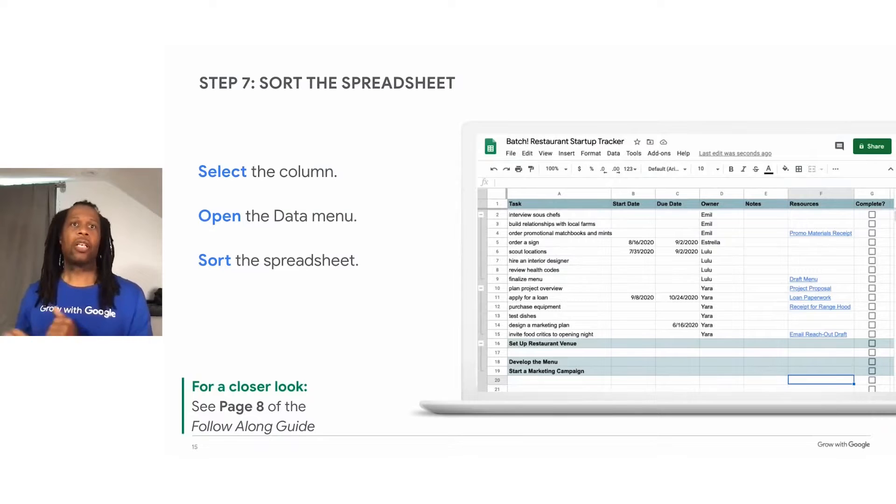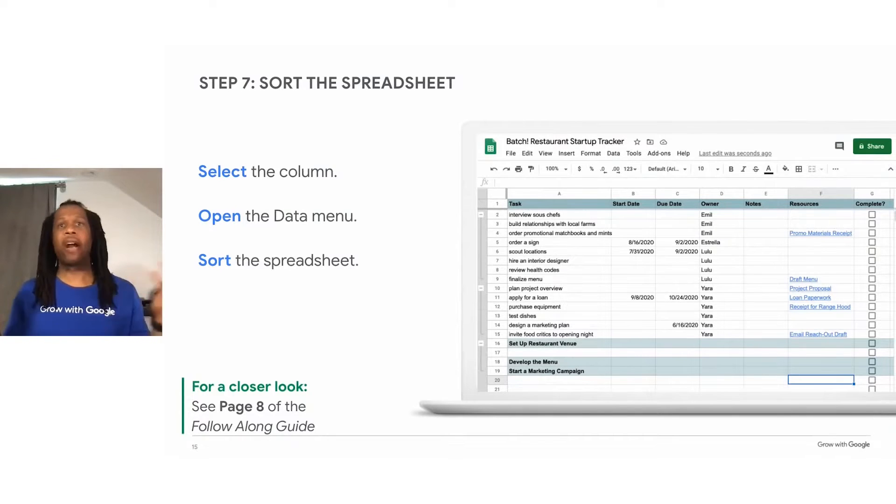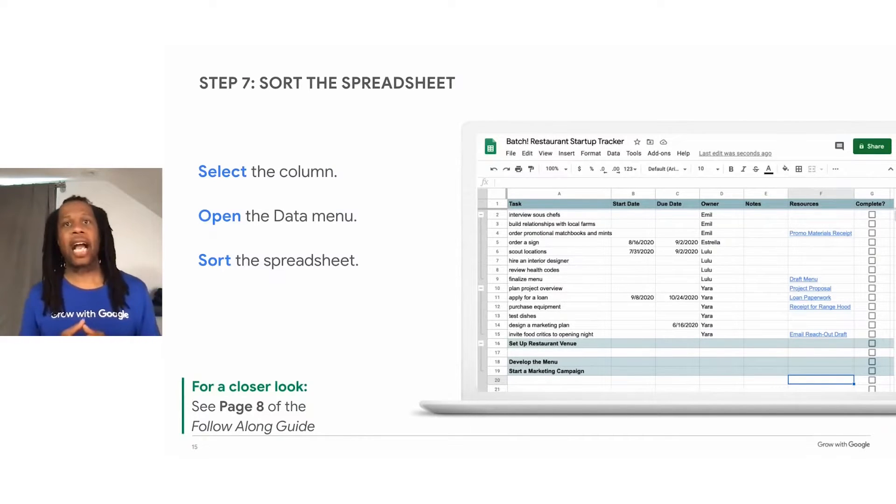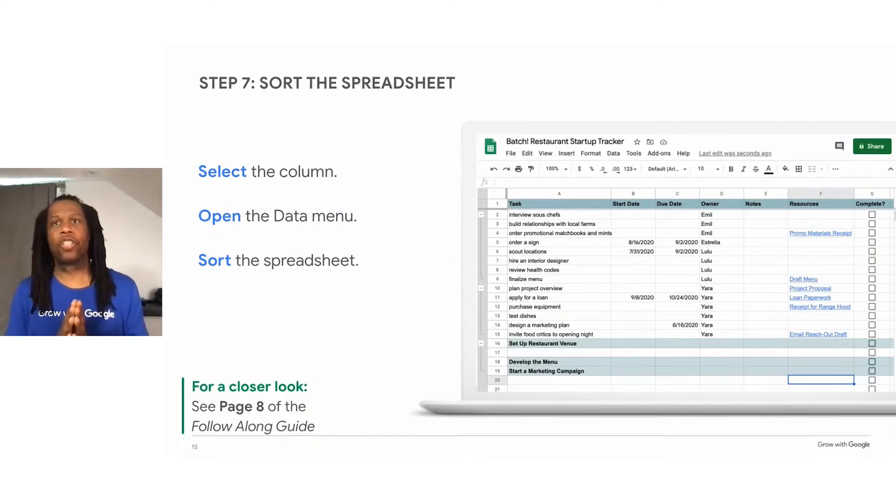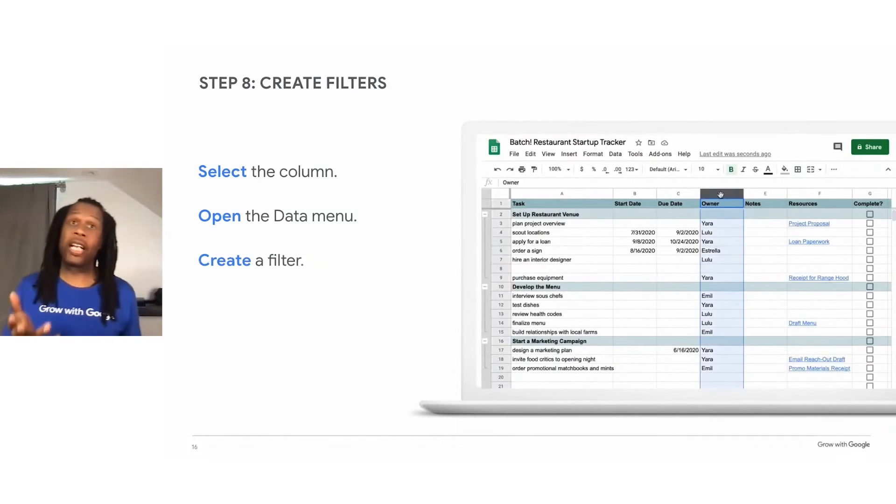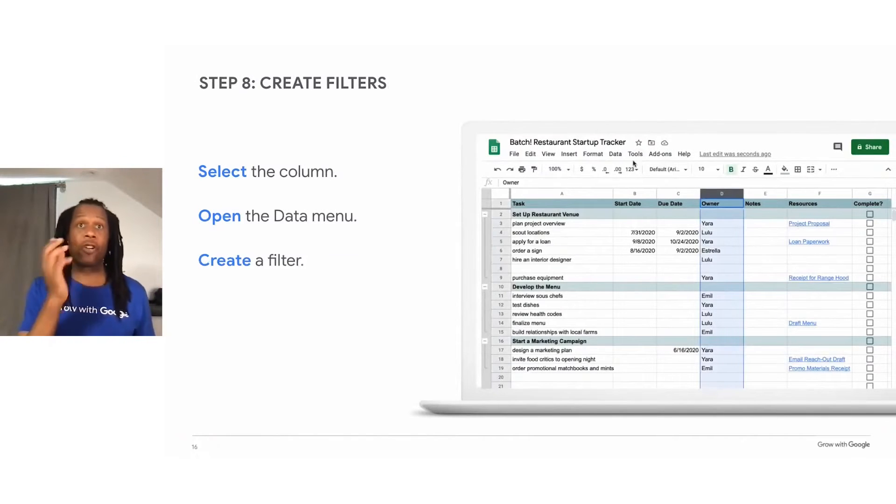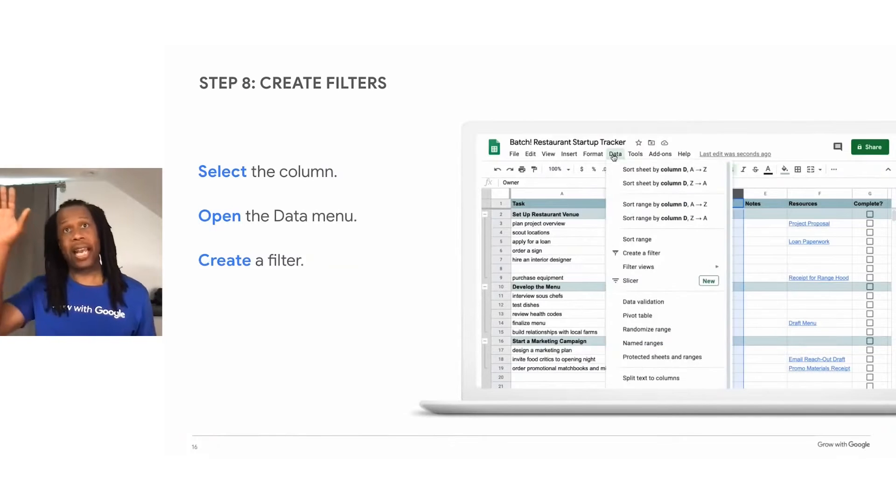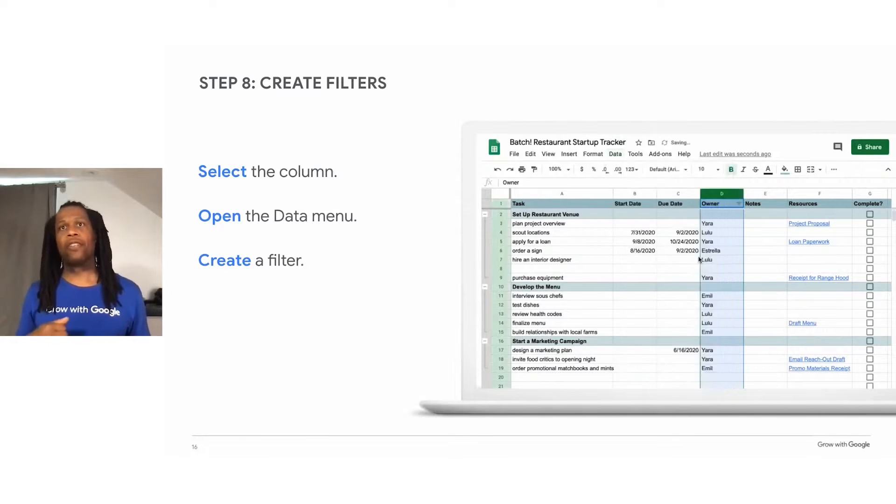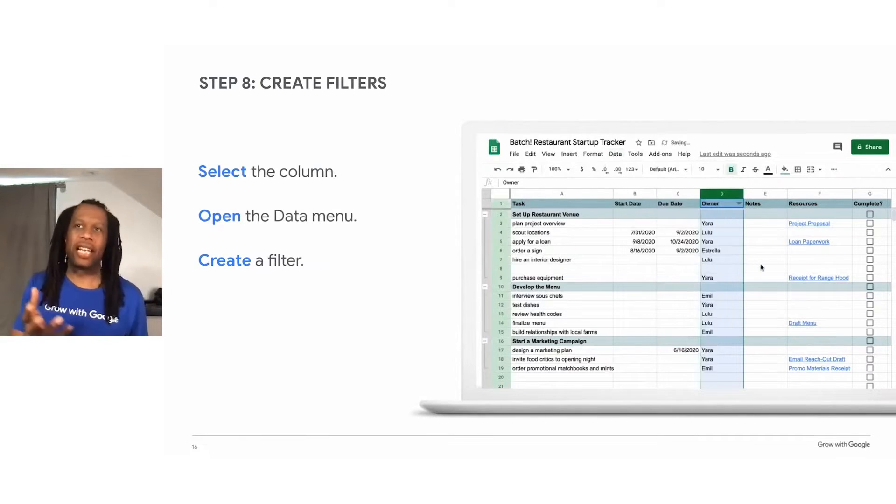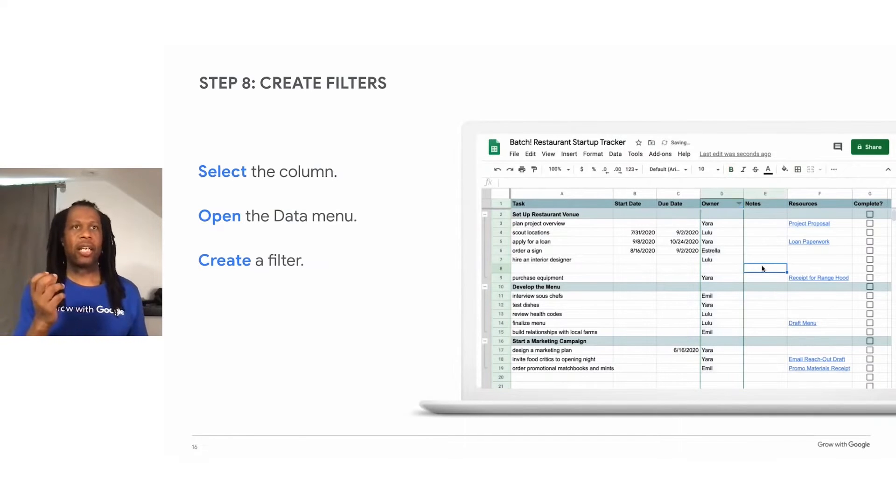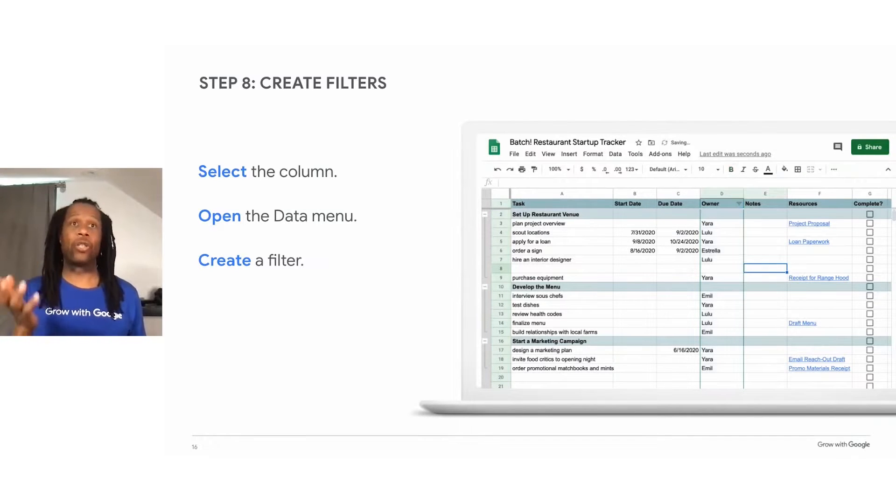Or you could sort based on the priority of the task. So if you had a column for a priority, you could sort the sheet to see which tasks are most important. Now, sorting can be handy if you're okay with looking at everything in numerical or alphabetical order. But you may want to isolate a particular piece of information. And in order to do this, you would actually use a filter.